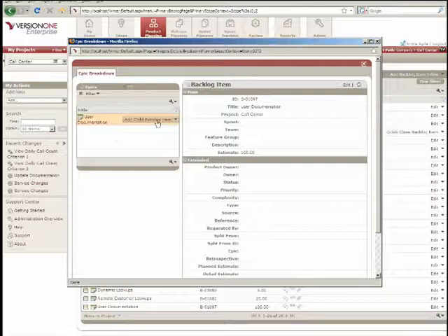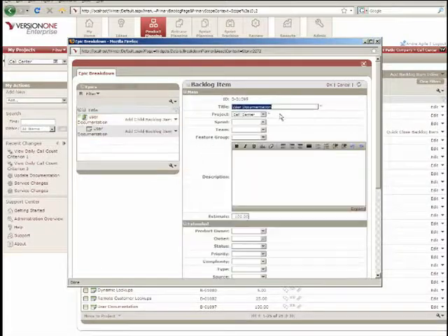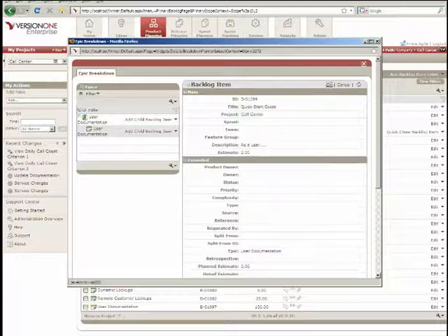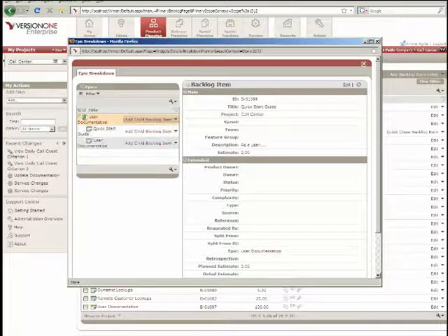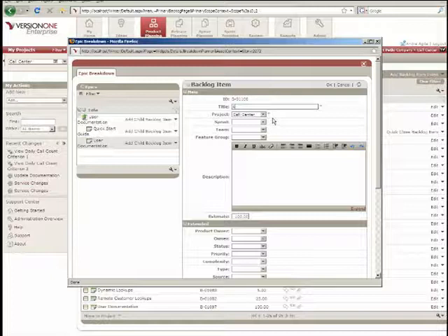And an example would be, what's involved in user documentation? Well, perhaps a quick start guide. And that probably has an estimate of maybe a 2. And you can go ahead and put your user story in here for that quick start guide, because now we're actually making user stories again. And what else is involved? Perhaps an API guide, and we can give that a 4 perhaps.